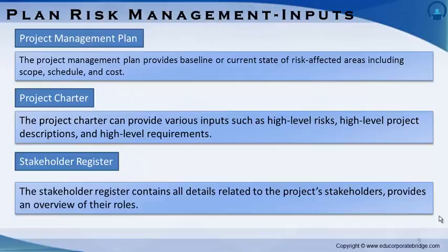So, in planning risk management, all approved subsidiary management plans and baselines should be taken into consideration in order to make the risk management plan consistent with them.